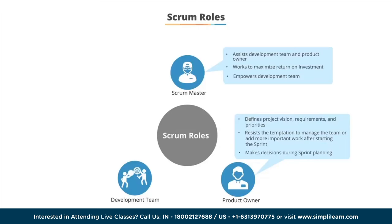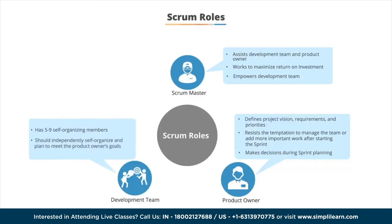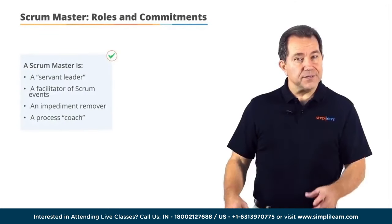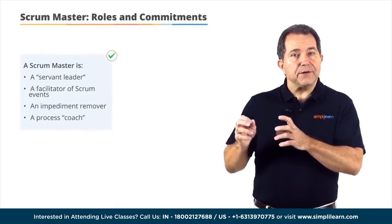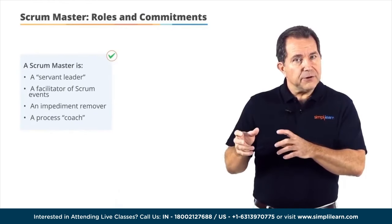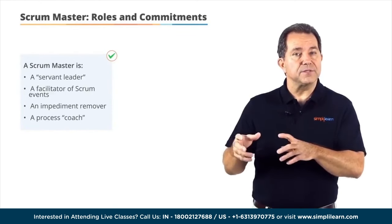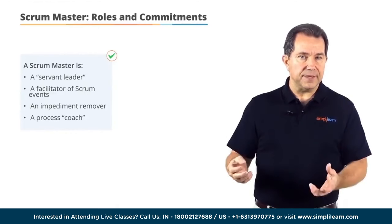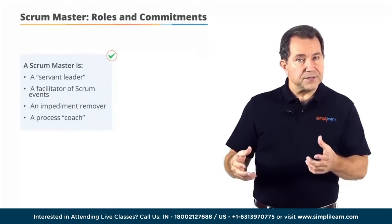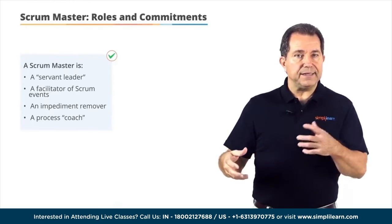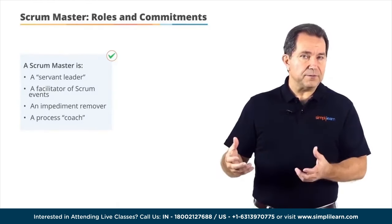The product owner must resist the temptation to manage the team or add more work after a sprint has begun, and must be willing to make hard choices during sprint planning. The development team comprises five to nine members with a mix of roles and has the autonomy to self-organize and choose how best to meet the product owner's goals. The scrum master is a skilled servant leader with very little formal authority, facilitating ceremonies such as sprint planning, daily stand-up, sprint review, and sprint retrospective.